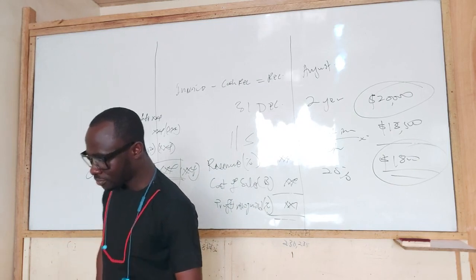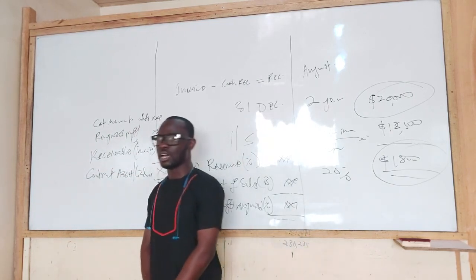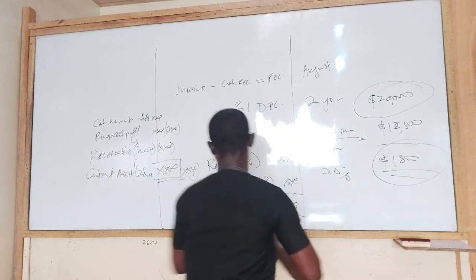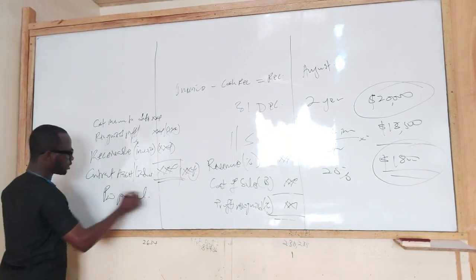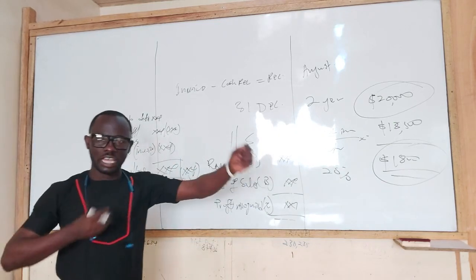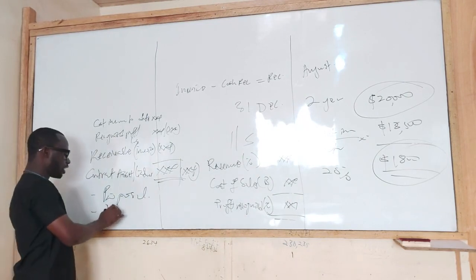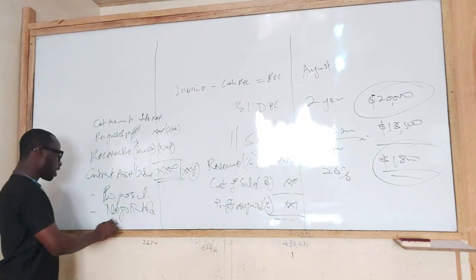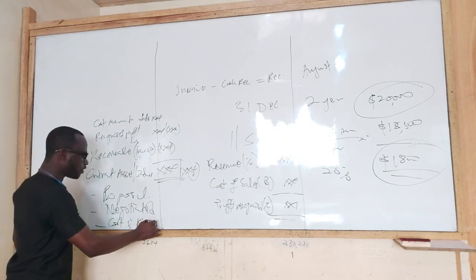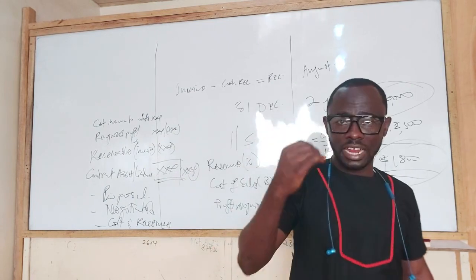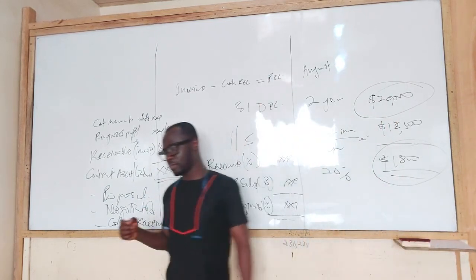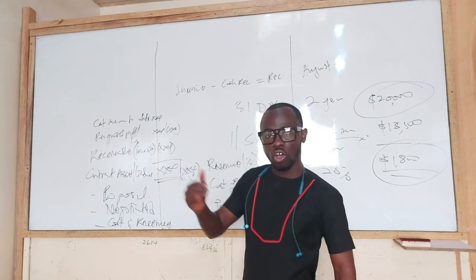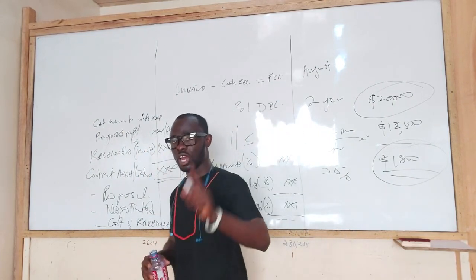And then the third thing is that the cost and revenues of each asset can be identified. So number one has to do with what? Proposal. We submitted separate proposals. Number two, the contractor and then the customer agreed and negotiated separately each of the assets. Okay, so separate negotiation. Then number three, the cost and revenue of each of the components of the assets can be what? Recognized. That is when we will recognize them in relation to that as a separate contract. If these three things are not there, then the various number of assets will be recognized as a single contract.